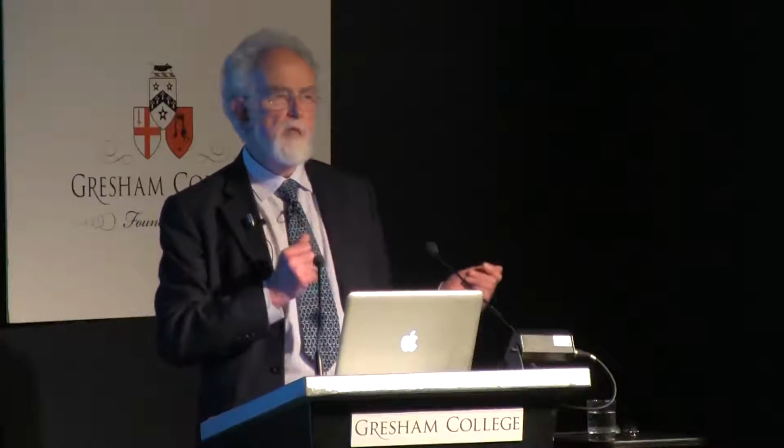that process too. And the reason it takes so long is because you've got to trial the processes with enough people. You've got to go through a lot of iterations in order to make sure that the processes work. And while you're doing this, and while you're training people, first in the prototypes that you're trying out, and then in the real system before you can cut it over, you're going to need additional people to do the work of the people that you're now interacting with or training. So there are a lot of things that you need to do in order to bring about a business change, and it's expensive and slow.